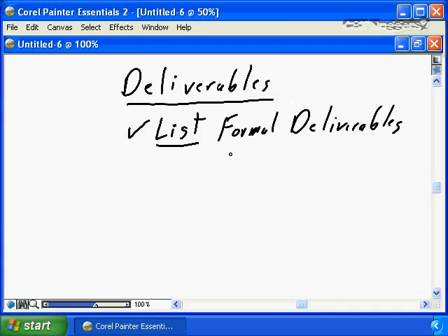But simply defining you're going to produce deliverable number 1, deliverable number 2, deliverable number 3, which is the requirements, which is the design, which is the final product, is a good step, but that probably isn't clear enough. That still leaves room for interpretation, leaves room for ambiguity. So instead of simply providing a list of final deliverables, you need to provide a list of final deliverables with a paragraph